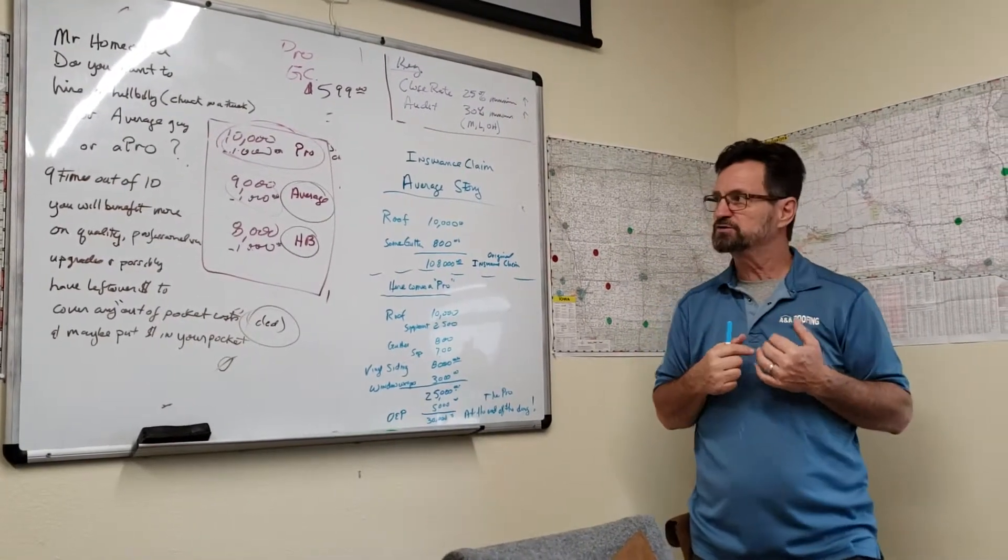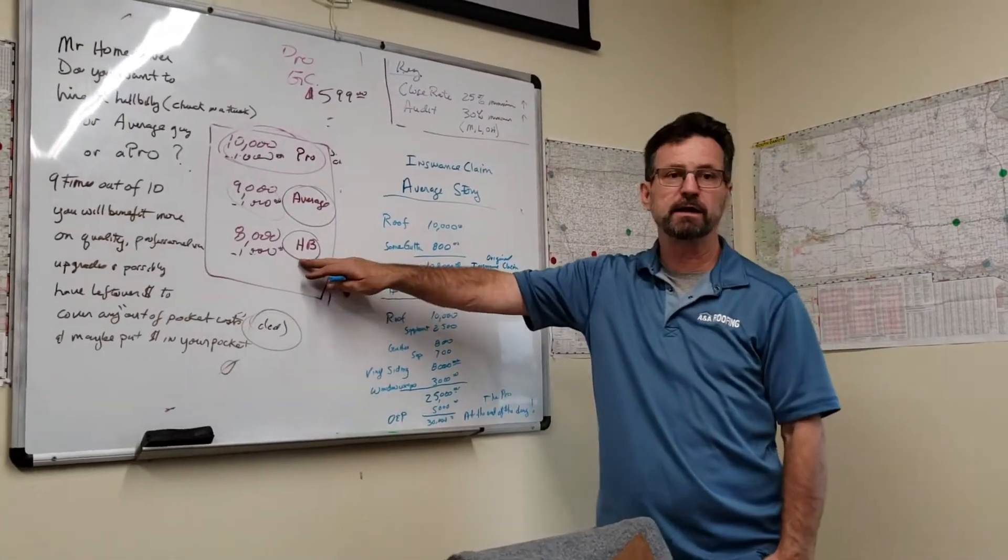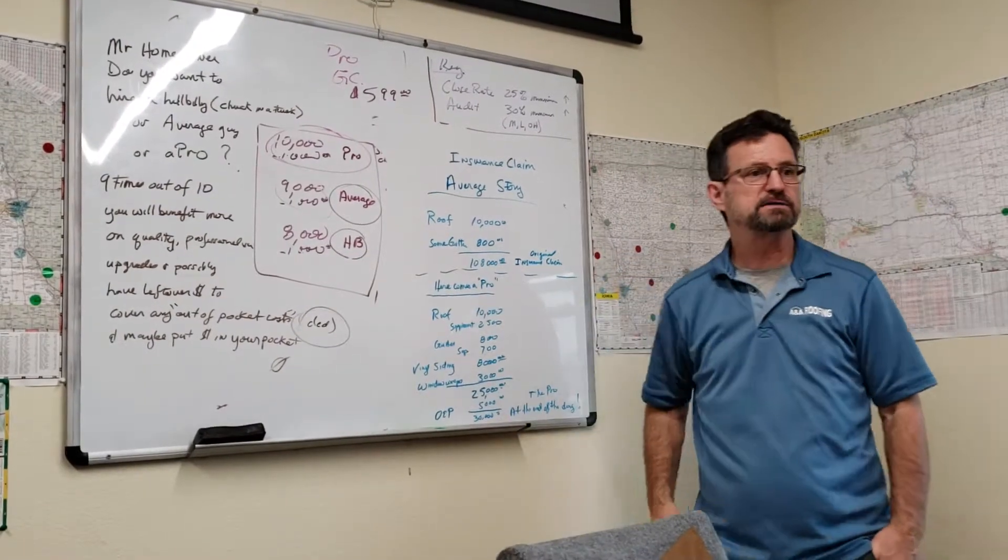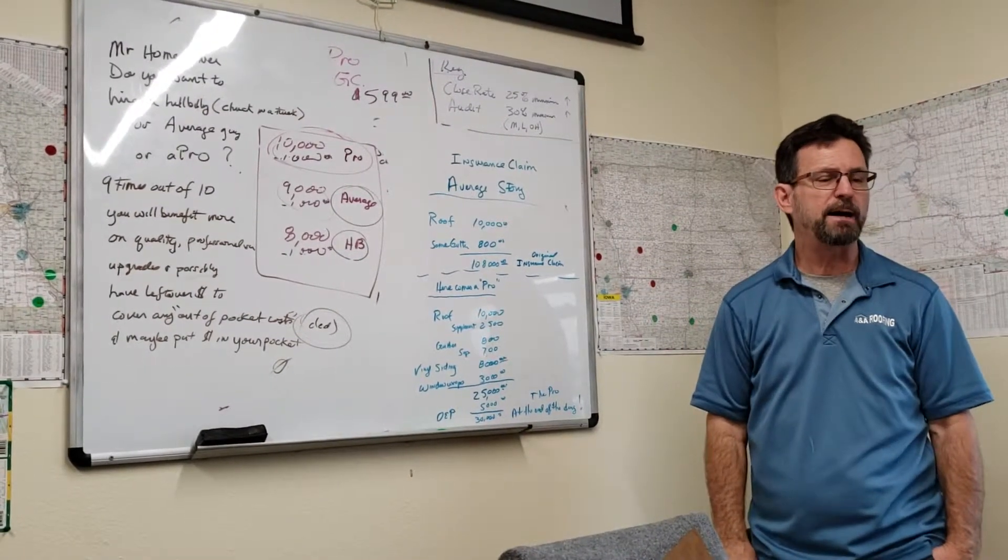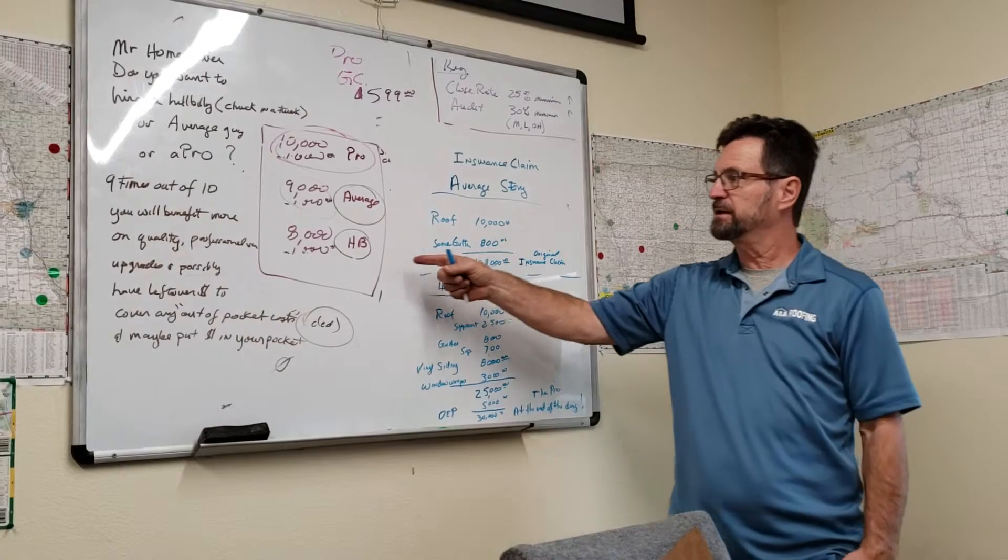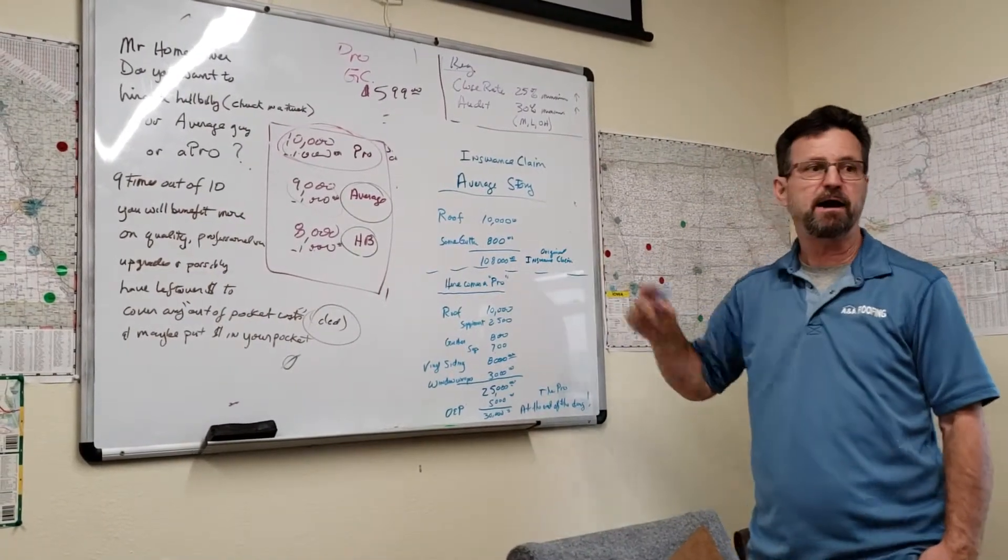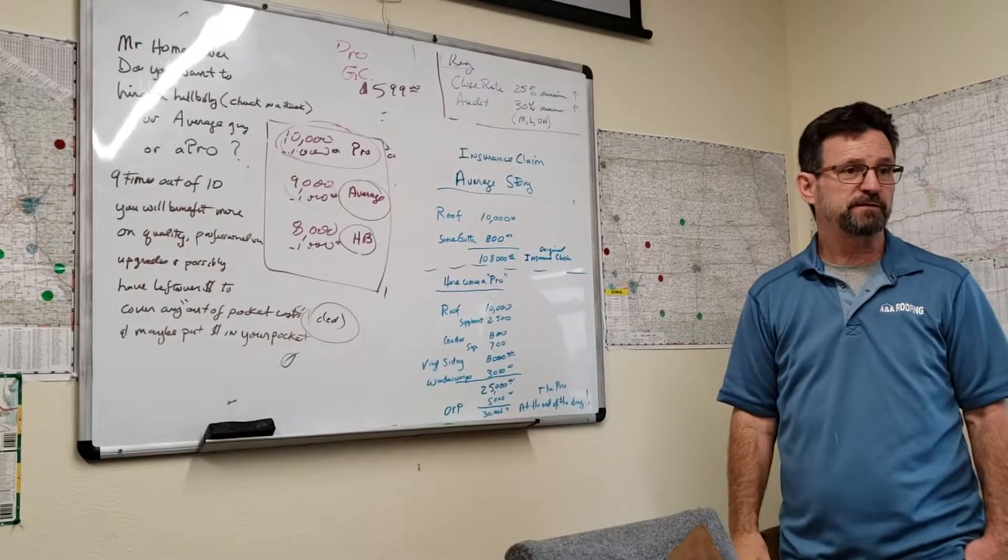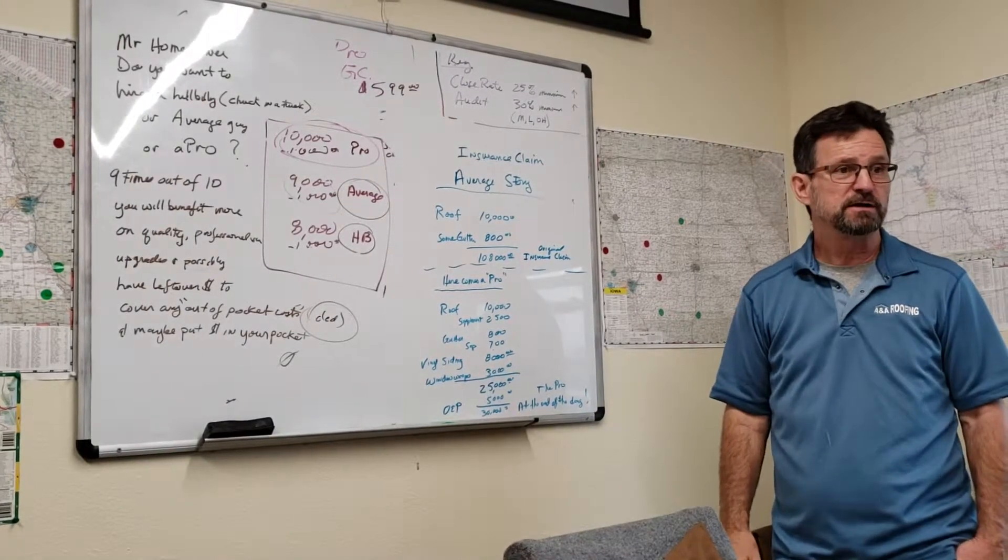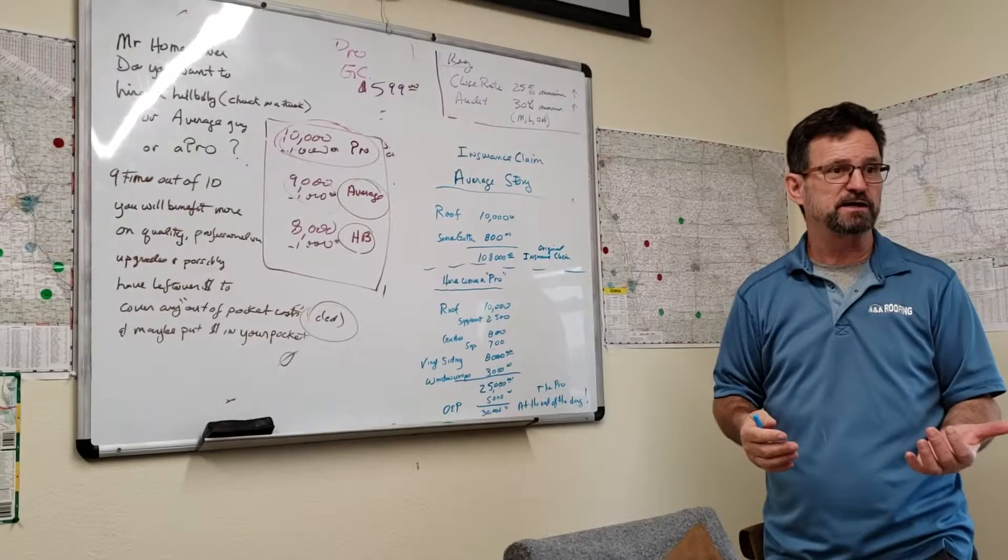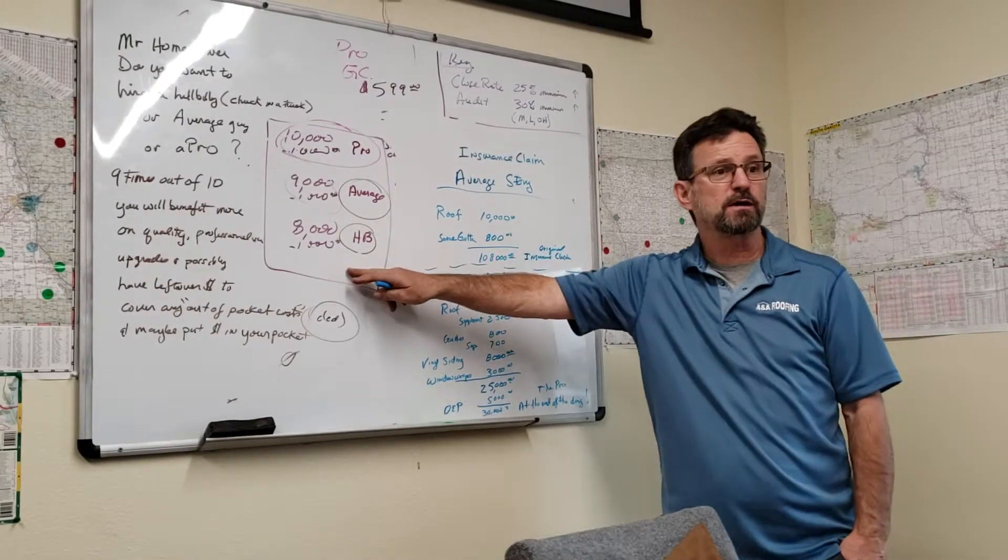Guess what? Most homeowners go out and hire a hillbilly to do that work for $8,000. What happens? The insurance company gets the final bill. It was less than their amount, so they back off the depreciation. In other words, you still pay your $1,000 deductible, but now you get inferior work.